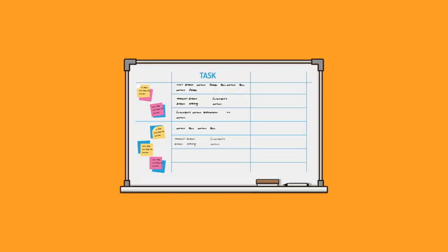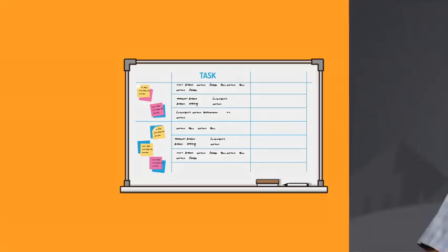This helps a team assess whether they are committing to too much work, too little, or just the right amount in the coming sprint. No one should expect the team to leave a sprint planning meeting having thought of everything. The sprint backlog will emerge throughout the sprint. A good team will think of most things during sprint planning. But I think it's impossible on a complex project to think of all tasks up front.